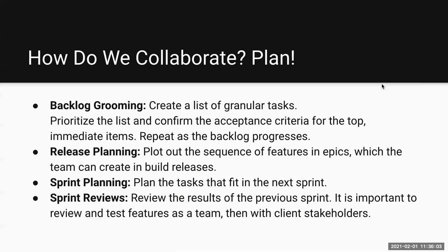And you want to involve the client stakeholders because you are responsible for the work that you're producing, and showing them, hey, here's the progress we made. And it's not just about building. It's also about striving to get to something to help them and their users. Sprint reviews also help you in that cycle of preparing for the next sprint planning. If you know what work you just did, you can better prepare for the next sprint.